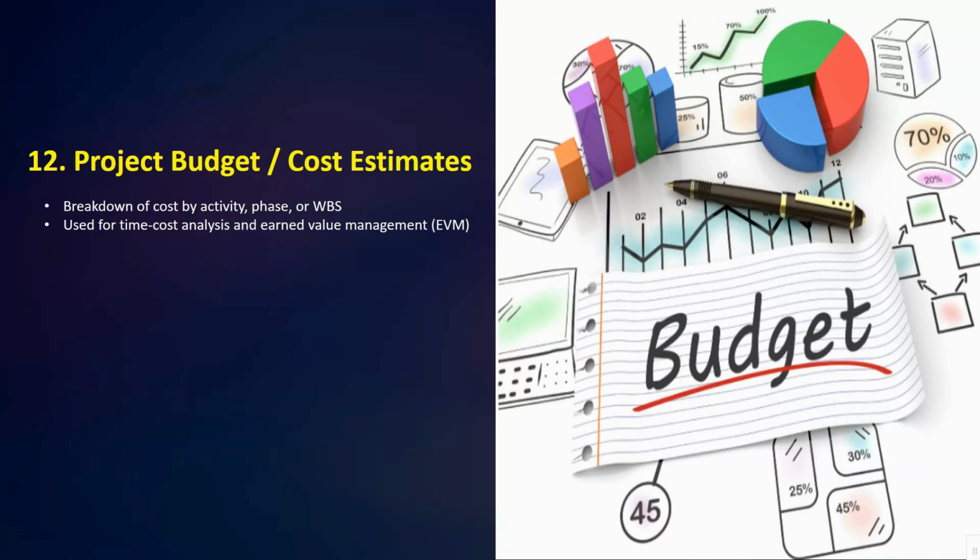So we also need to prepare the project budget or cost estimation. So this document provides the breakdown of the costs by activities, phases, or WBS. So it is essential for time cost analysis and for applying earned value management during the project execution.